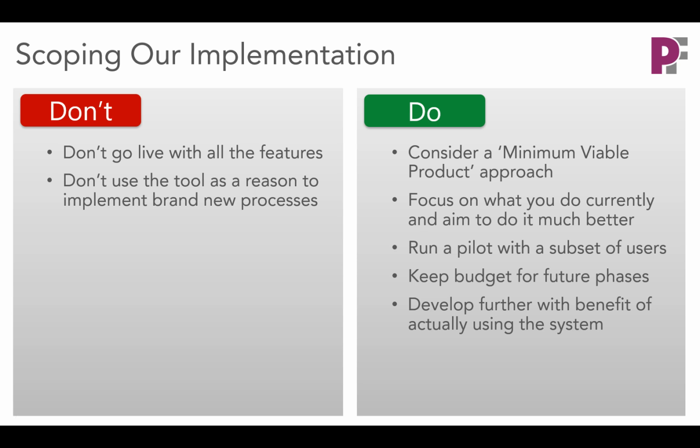And here's one particular feature area that we would always advise you leave for later, and that's the development of automations. Unlikely to be something you want to do for day one, because it's hard to anticipate what automations will actually be useful unless you've really operated the new PPM tool for a while. And then you can make decisions in terms of what automations are going to be time saving or of benefit, and you can specify them in the context of your actual experience.